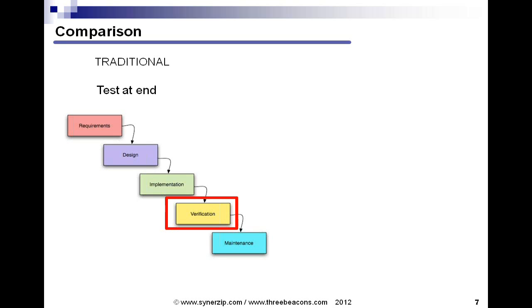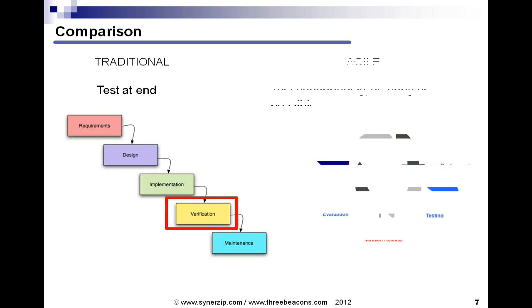Also, in traditional, we do this verification testing at the end. Certainly not advisable, because historically that can cause slips in the project schedule. When this big bang integration is done at the end, often that can cause a schedule slip, primarily because of a lack of collaboration between the teams that are integrating their software systems. Now I know that that's a generalized statement. It is, however, based on my experience, and I've lived through many of these, so certainly that was my experience.